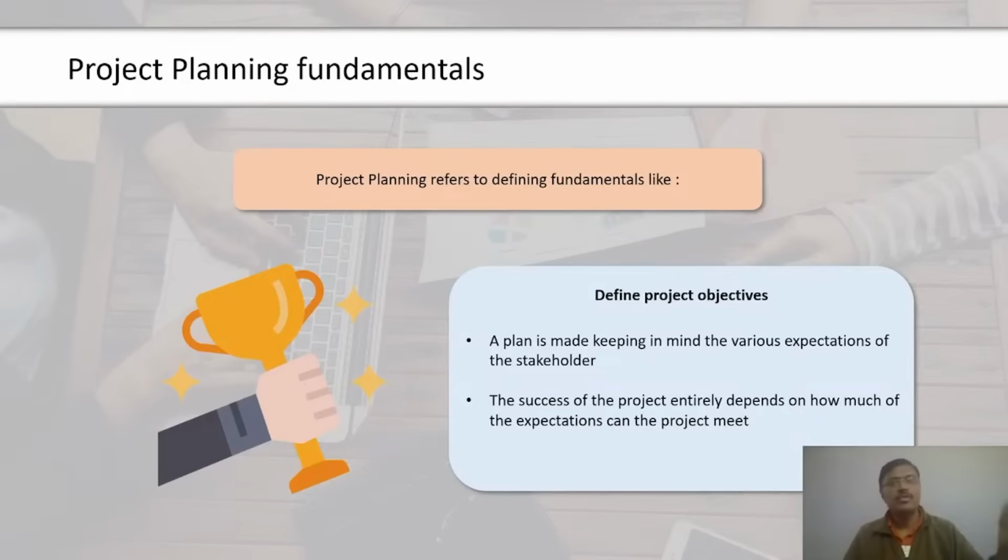Several analytical techniques may be used to determine the schedule management plan. These may include different planning approaches and philosophies, such as rolling wave planning, or different scheduling software that allows building what-if scenarios and studying the effect of advanced scheduling techniques like leveling, fast tracking, and crashing. Now, let us look at the outputs of this process. Schedule management plan is a component of the project management plan that describes the criteria and activities required to arrive at the project schedule, as well as how the project may be baselined, monitored, and controlled.